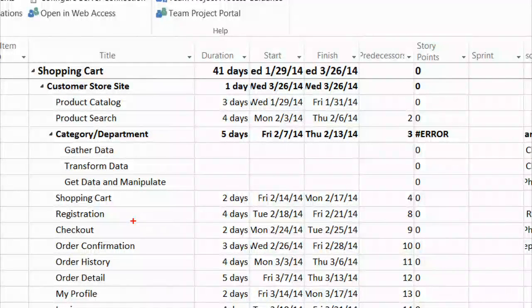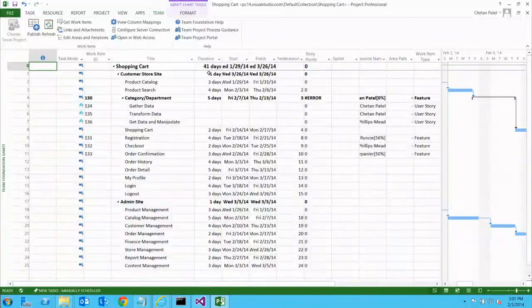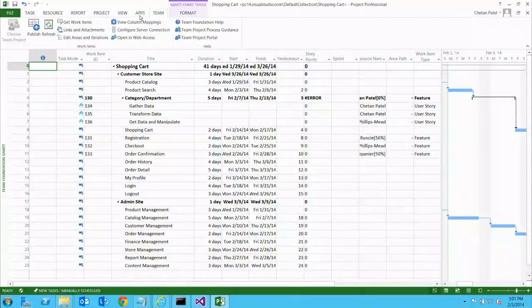Now you can choose not to. In fact, we're going to continue the demo and go right into doing actuals, because sometimes you don't want all that detail to roll into your project schedule. I still want to maintain that high-level picture. But the idea is I have that flexibility to connect these pieces together. Now, what Chaitan's saying is you notice there's an error there, because he's pulled down Project Server, basically online, enterprise fields. And at this point, the native connector that comes with the utilities isn't aware of that. Chaitan, go ahead. Let's continue.